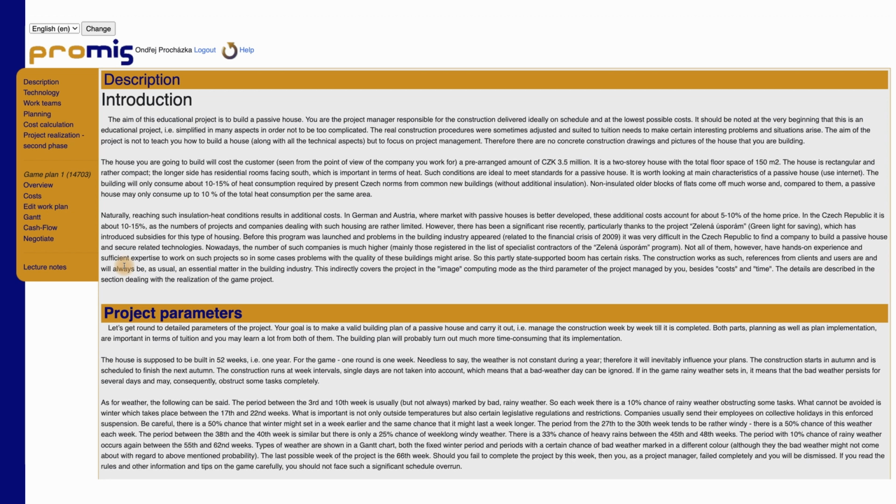It makes sense to spread them on a critical path within the project. At the same time, it is wise to look at the costliness of jobs and protect with reserves mainly the very expensive ones, whose modifications in the realization phase would mean high additional costs.